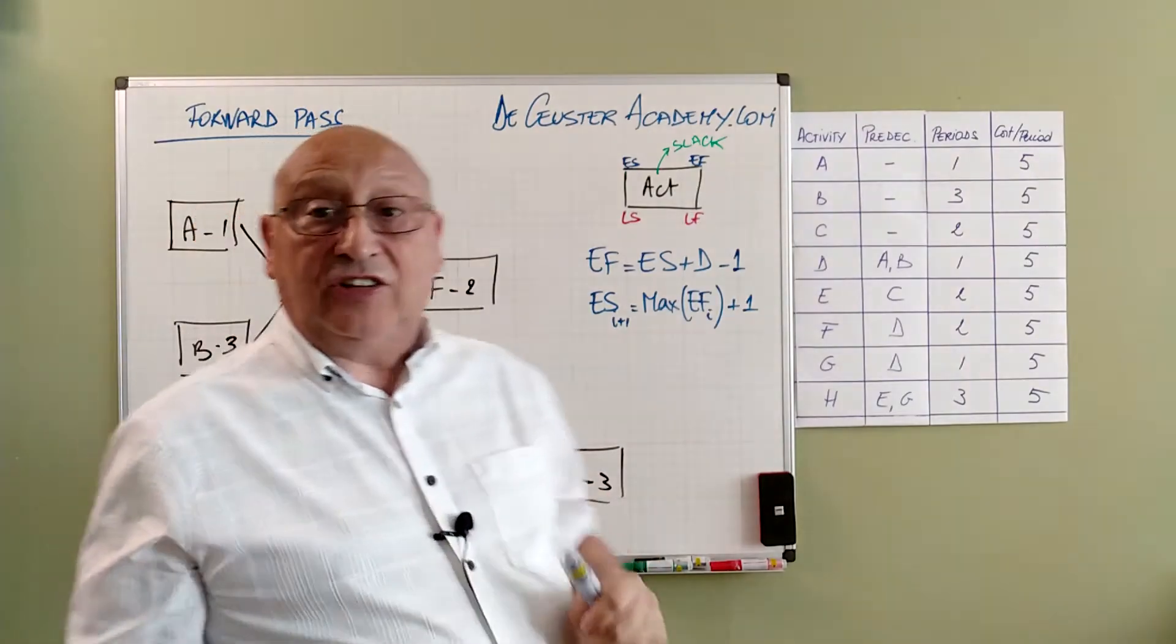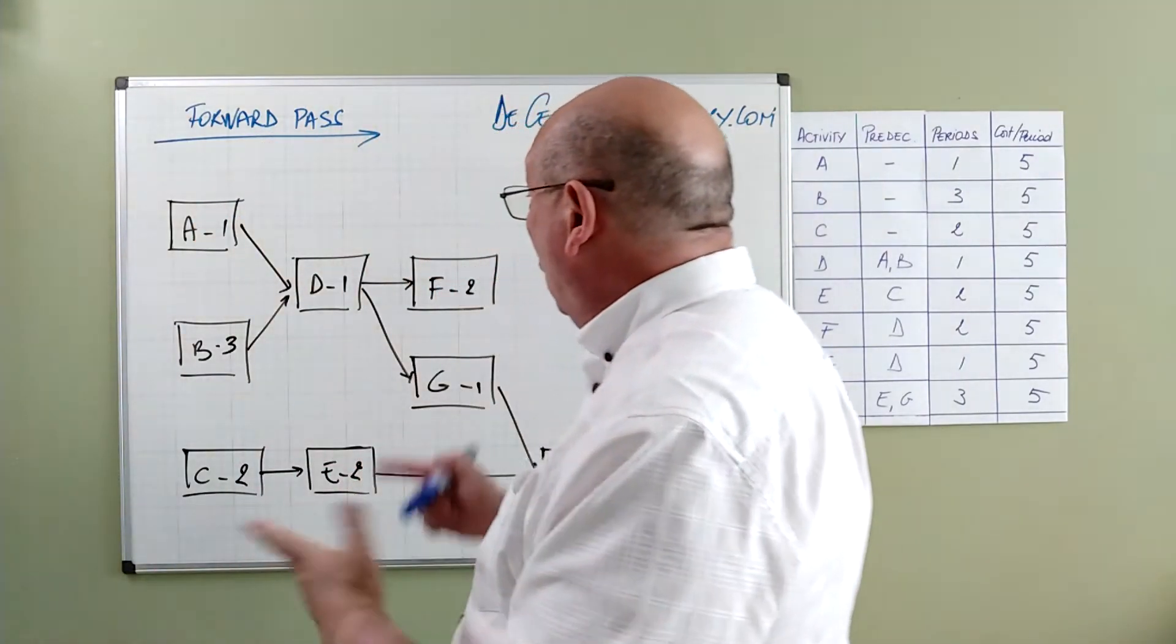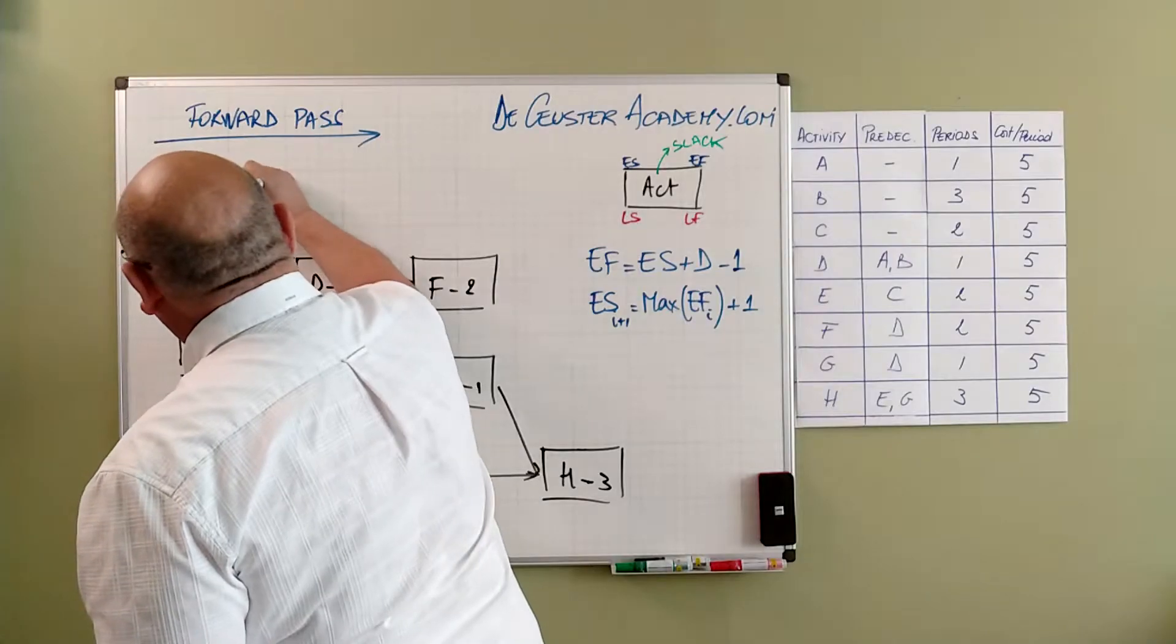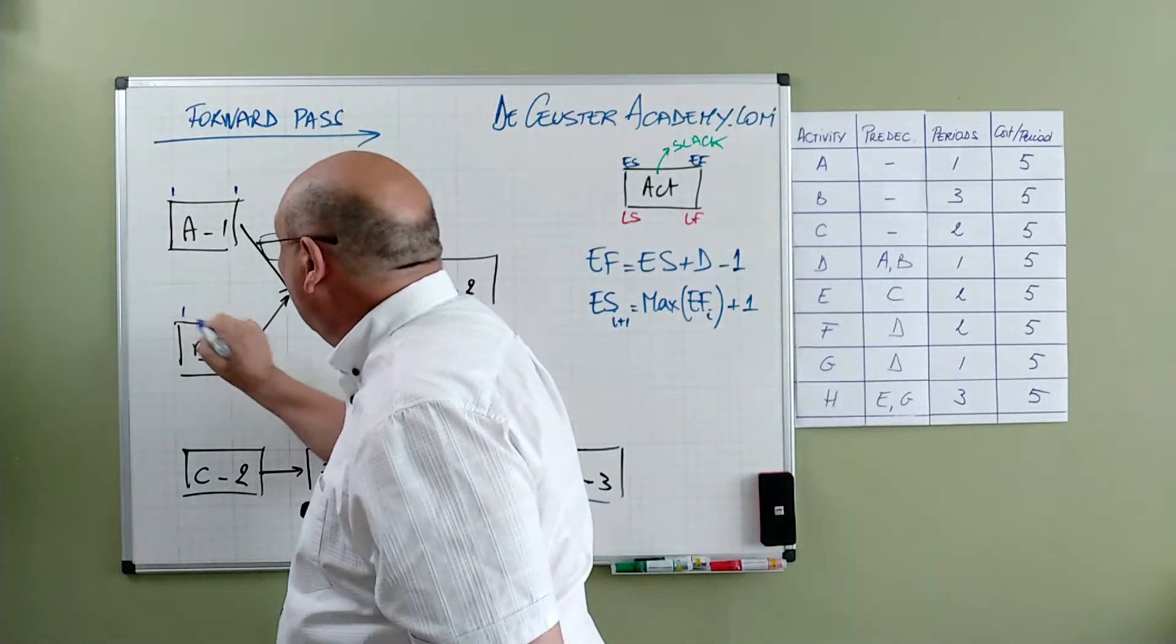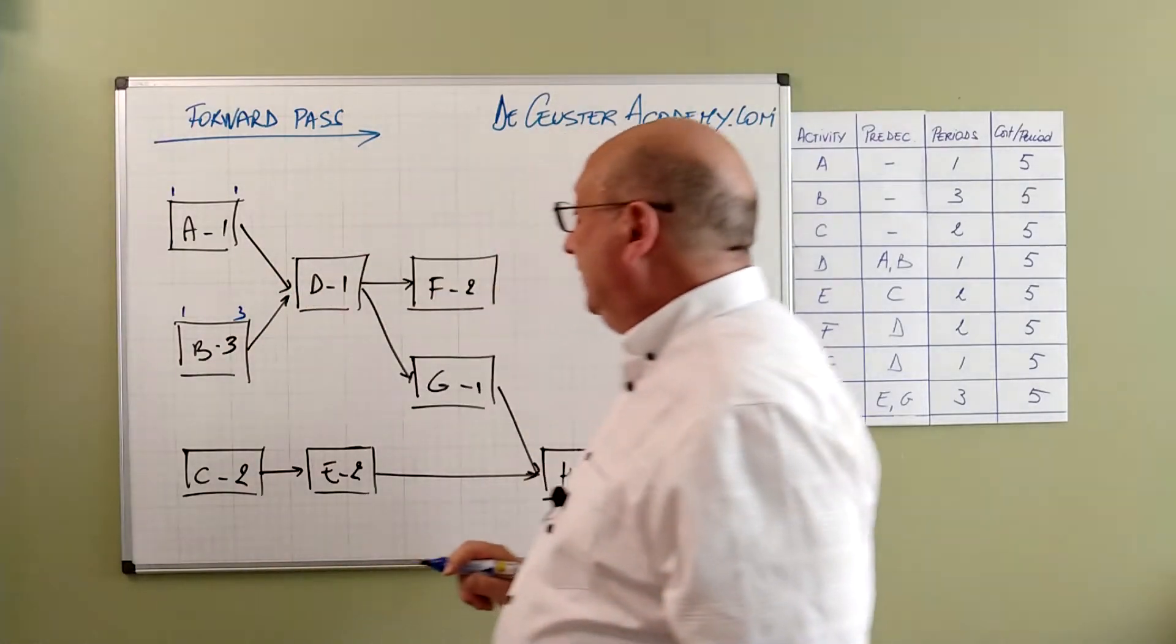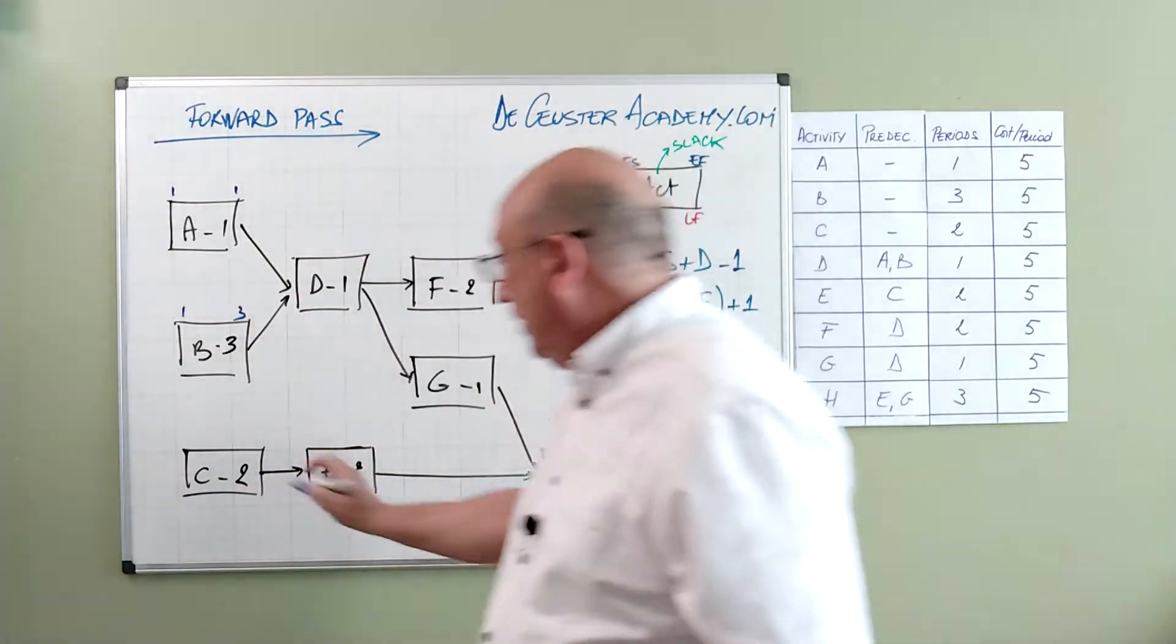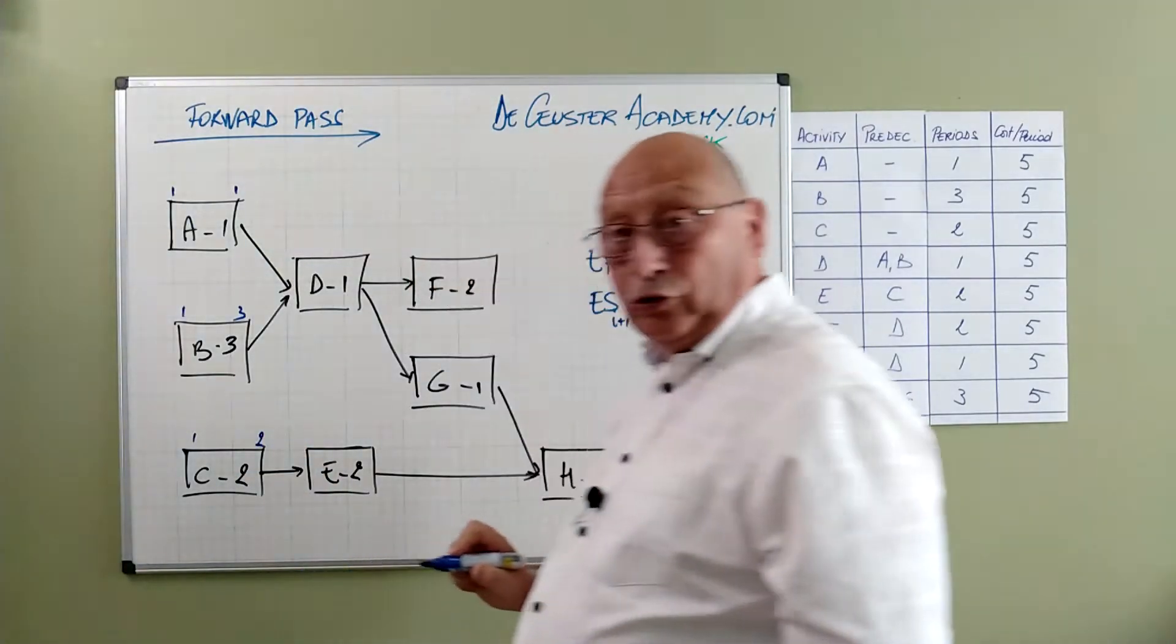Let's have a look at this calculation. First of all A, A plus 1 minus 1 is 1. B, 1 plus 3 minus 1 is 3. And for C I have 1 plus 2 minus 1 is 2.